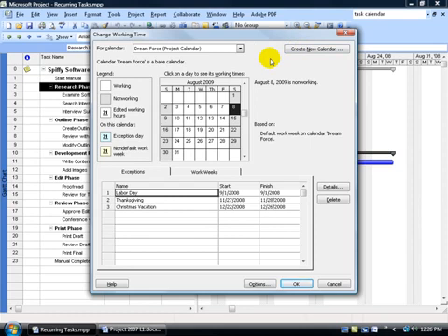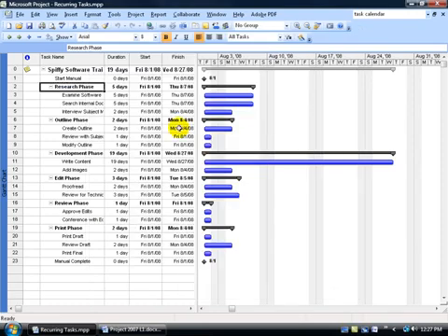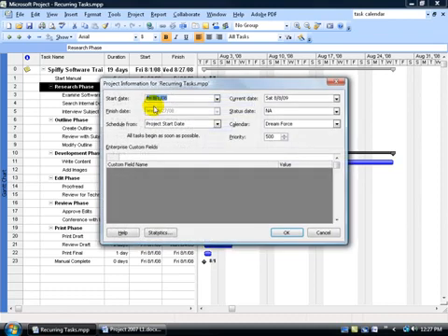So in other words, what I'm saying is you can create 20,000 calendars here. It doesn't make it a project calendar, doesn't make it a resource or a task calendar until you actually assign it to one of those 3, the project, the resource, or a specific task. So create hundreds of them in here. And like we did for the project, to assign the calendar we created to the project, we came up here, went to project information, and we said calendar, you are now assigned to Dreamforce. That includes all its rights, days off, vacation, whatever we created as the Dreamforce calendar.